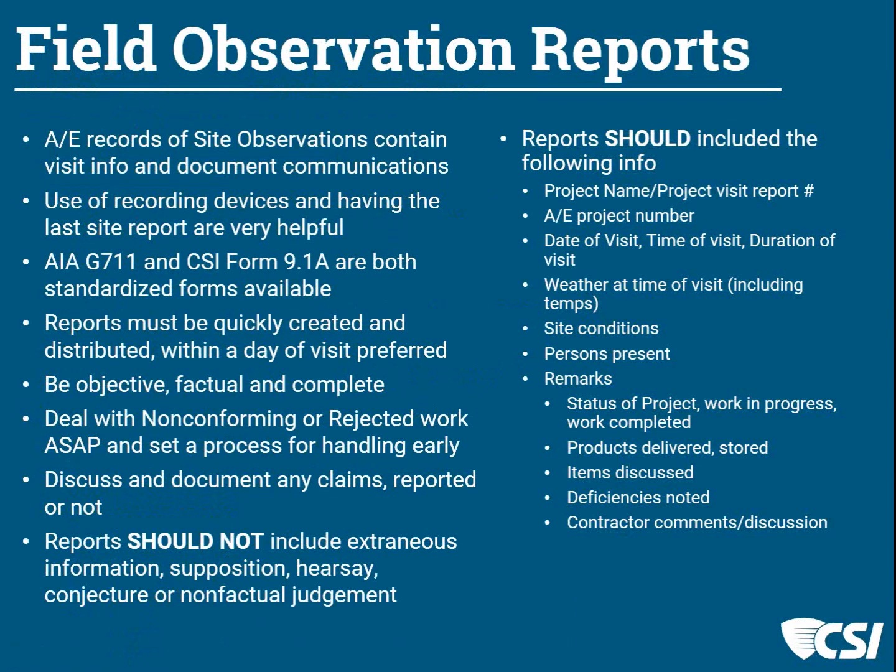So, there are easy parts that will make this turnaround of documents fairly easy to do quickly. Project names and report numbers, your contact information, when you were there, how long you were there, when you left, what the temperature and weather conditions were at the time, what site conditions were.